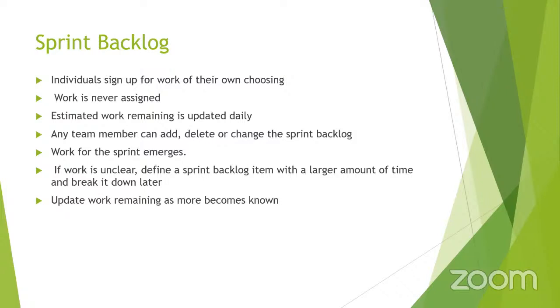If the work is unclear, then we can break it down into multiple smaller tasks. Let's say a big task was there earlier when the sprint planning was done, you were not aware of the complexity and you gave it 3 points, but it might take 10 days. Then you can further break it down. Once the breakdown is complete, the remaining work is more clear.